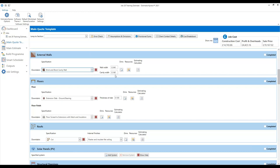We can see a couple of key dimensions for the wall — the overall wall width and the cavity width. These are set to 340 at the moment, but you might say you're extending a property where the existing walls are 300mm wide, so you can overwrite that here and set the cavity to only 100mm. Of course, that's only a couple of dimensions for our walls. If we press the dims button — dims is just short for dimensions — that will allow us to review the dimensions for the wall as a whole.